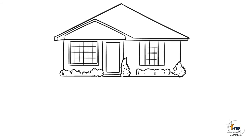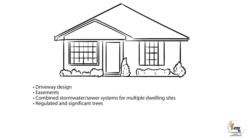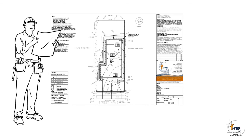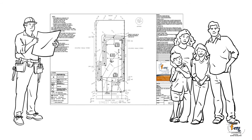Other issues which must be taken into consideration include the following. It is important to note that during the construction phase, the builder is responsible for ensuring temporary drainage and disposal of roof and storm water is managed. After handover, it is the responsibility of the homeowner to ensure site drainage and paving is in place as soon as practical.